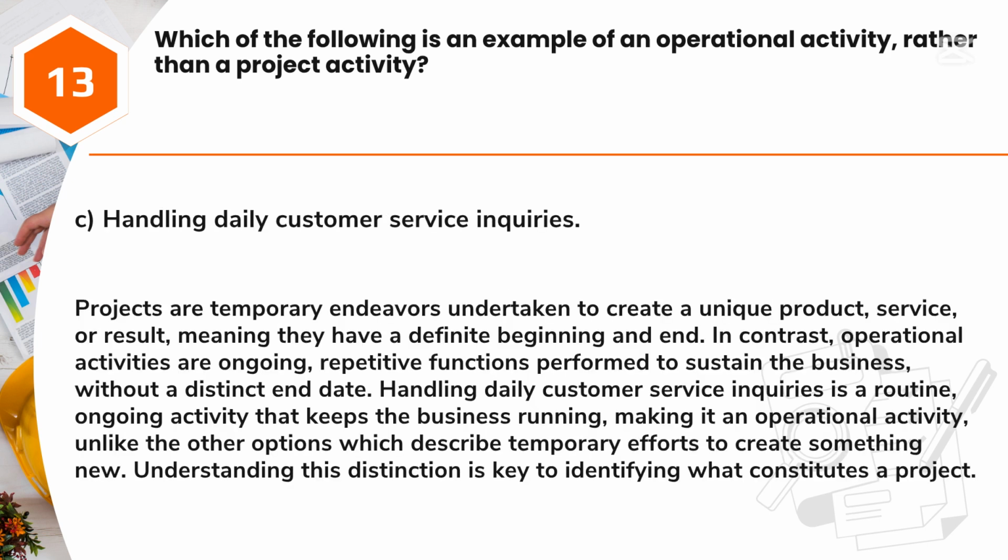Answer: C. Handling daily customer service inquiries. Projects are temporary endeavors undertaken to create a unique product, service, or result, meaning they have a definite beginning and end. In contrast, operational activities are ongoing, repetitive functions performed to sustain the business, without a distinct end date. Handling daily customer service inquiries is a routine, ongoing activity that keeps the business running, making it an operational activity, unlike the other options which describe temporary efforts to create something new. Understanding this distinction is key to identifying what constitutes a project.